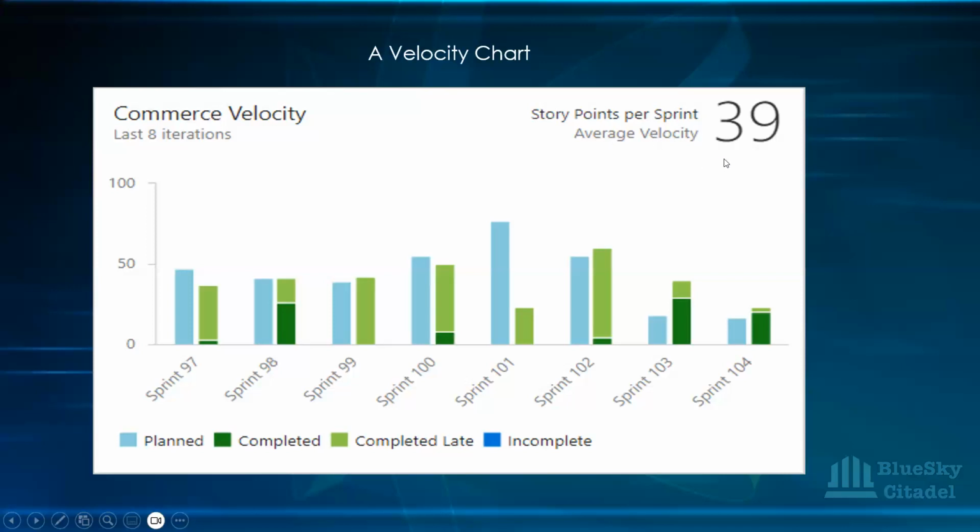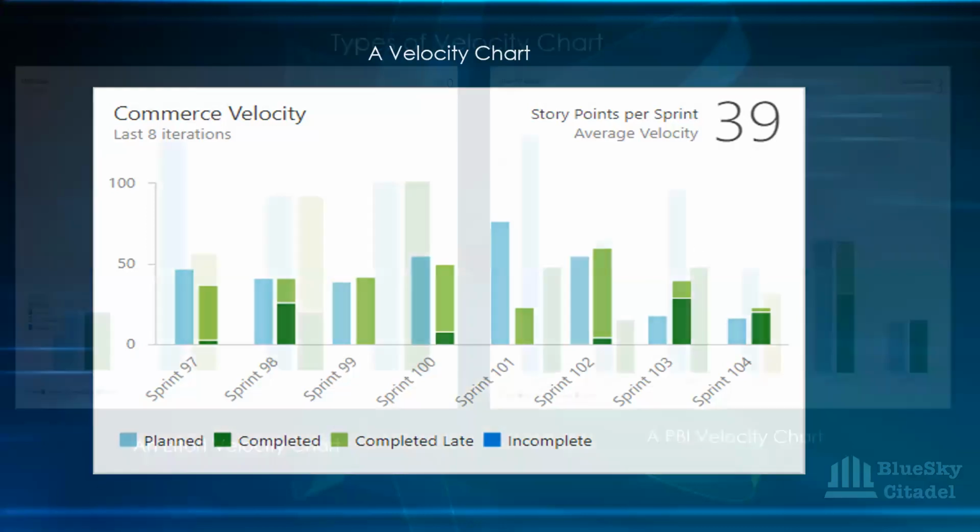So it's saying story points per sprint. Average velocity is telling this team not to take in more than 39 story points when they're going to go into their next sprint, based on their performance over a period of eight sprints. So this has been configured for the last 8 sprints, and that is what it's telling them here, that don't take in more than this. If they're able to take in this and they finish it, in the next sprint, it will give them another average velocity that they can work with. Because the chart, you want to pick the information on the chart and follow the information you have on the chart also as you go ahead.